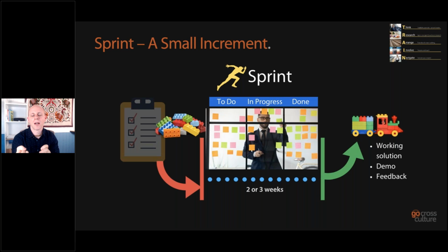Examples: login, creating a user account, searching for a book, and I'm keeping this very basic on purpose just to illustrate principles. Searching for a book, adding a book to a basket, for example, paying with a credit card, and the payment can just be putting all your credit card details in and submitting. There's no adding of payment methods or saving payment methods. So you could see that as a potential increment of working software that could allow the